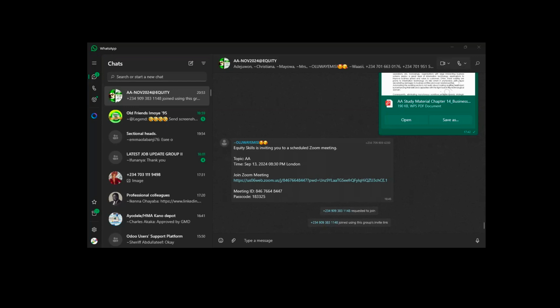Then you also need to check whether those assets, the cost of building, have been capitalized. Why do you need to capitalize? Most organizations, when they are building, have what we call project cost or a project manager. The project manager enables them to track all the costs attributable to completing that particular project. At the end of the day, all the costs will be added together to determine the full value of that asset.